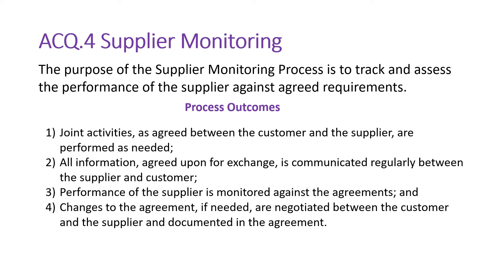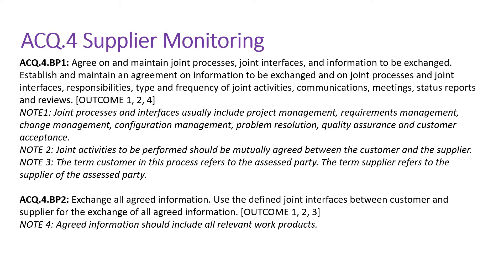Initially you will have a contract document — the agreement between the supplier and the customer or client. If you have a contract document and any change in the scope of work, then you need to get formal approval from the customer. Best Practice 1 talks about agreeing on and maintaining joint processes, joint interfaces, and information to be exchanged.